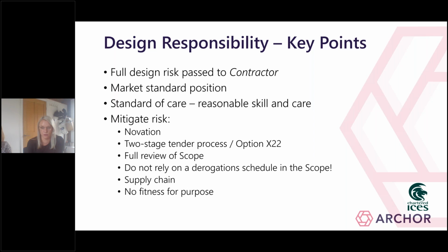Well, firstly, if you are intending to rely on the information within the scope, it would be very sensible to establish a contractual link between you and the consultants who have prepared that design. This is very often achieved within the main contract itself by novating the appointment from the client to the contractor, so that the contractor steps into the shoes of the client for the purposes of the appointment.